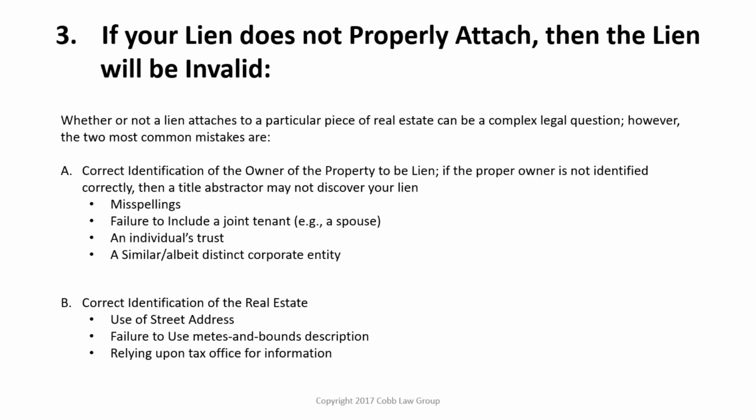So many people rely upon the tax office information for ownership and deed information. While that may be a useful starting point, do not rely upon that. Georgia has 159 counties. Of those counties, the vast majority update their lien record once a year, and that gives a lot of opportunity for transfers to occur, and so you may not be identifying the correct owner if you rely solely upon that information.